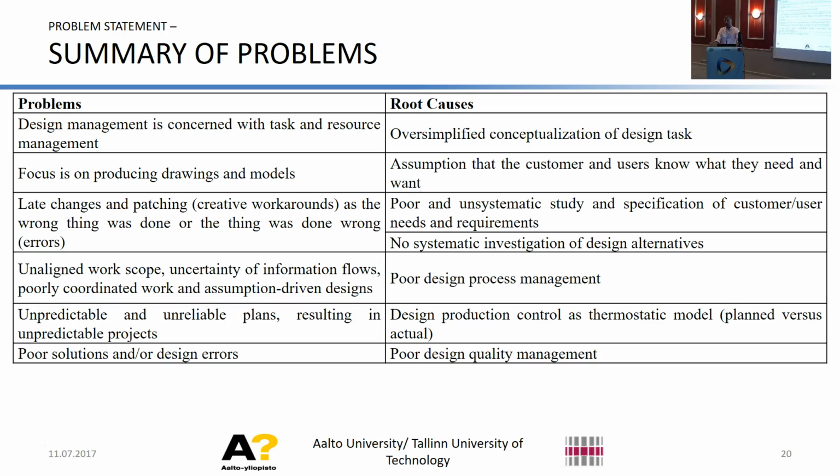As you saw, it's very typical in Estonian design offices and practice that the architect starts alone without any conversation with the other disciplines. He's making assumptions about what kind of columns or beams or MEP systems we will use in this design. And that leads to many, many problems, including whether it can actually be done. So you necessarily want to avoid this.